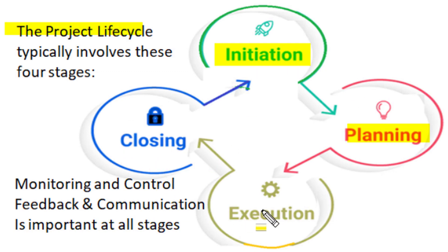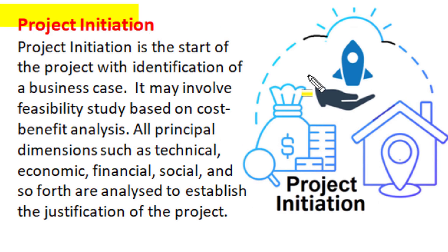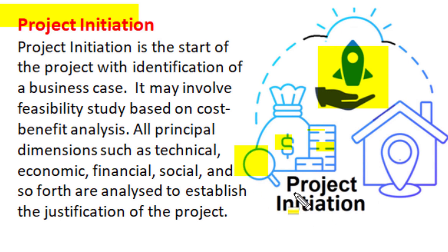During project management, appropriate monitoring and control of different activities is required, and for that, feedback and communication among team members is very important in all these stages. Project initiation is the start of a project with identification of the business case, and it may involve a feasibility study based on cost-benefit analysis. All principal dimensions such as technical, financial, economic, social, and so forth are properly analyzed to establish the justification of the project, and only after that is any project initiated.